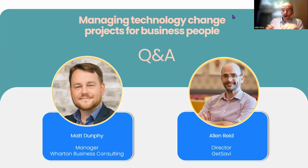They are technically off the shelf, but there's vast amounts of configuration that will be required. And technology partners either are very familiar with doing that kind of thing for your business or they're not. So actually the main task on most projects these days is fitting ready-made software to your business. And there are different areas of expertise and specialism around that and costs attached to being able to do that. So it must be outlined in an RFP, I would suggest.